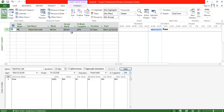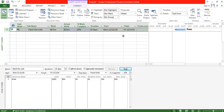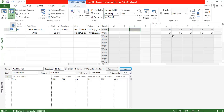When you highlight the task, you can see that the actual completed work shows 20 hours on the task itself, irrespective of how many users are assigned. It calculates the percentage work complete accordingly. Importantly, the duration and start date are not impacted. If you go to the task usage view, the system assumes that the 20 hours were completed by the same candidate — on Monday, Tuesday, and half of Wednesday — so there is no impact on the duration.